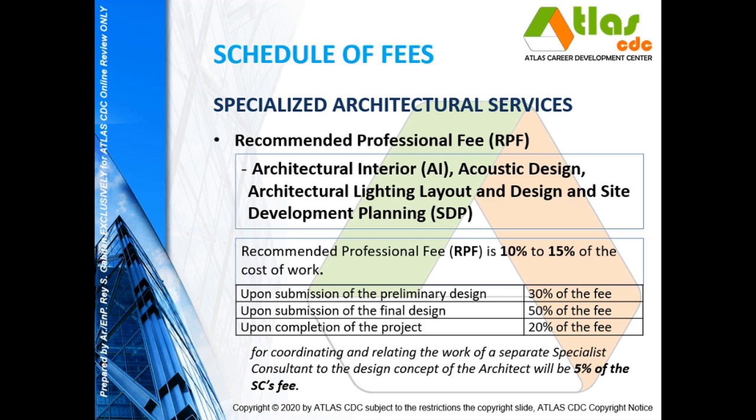Now, if there is a separate consultant other than the architect of record, and the architect of record will have to coordinate with that specialist architect, then the architect of record will have to be paid an additional 5% of the fee of the consultant. That is for coordination work.